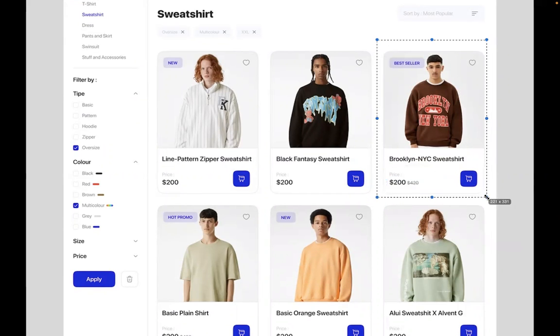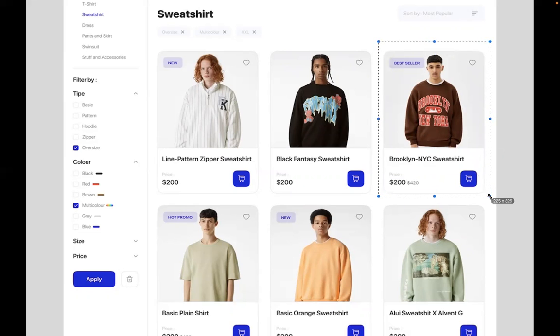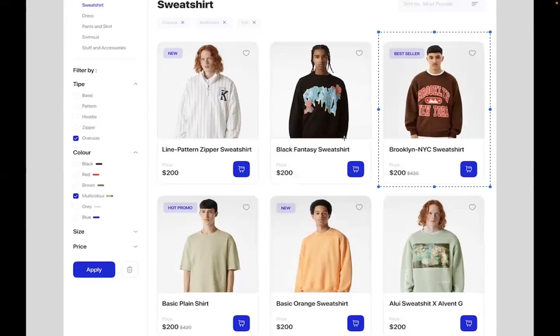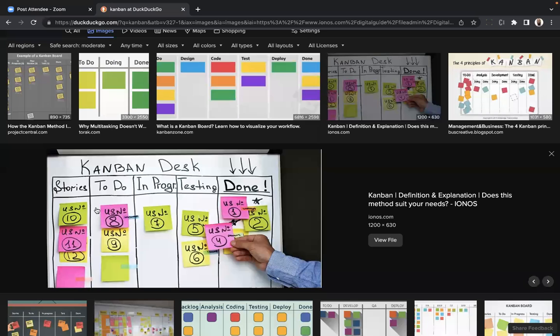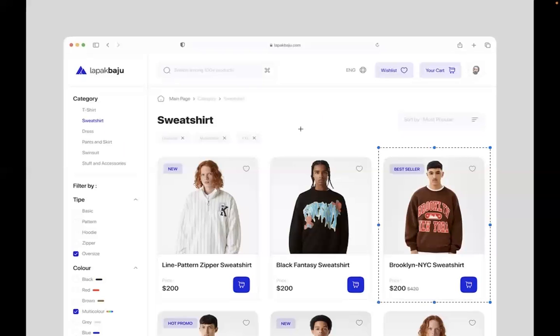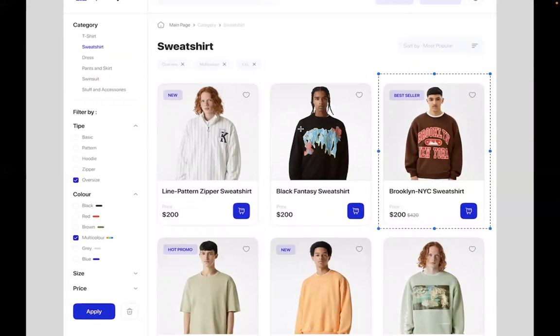Another task might say, after this button and this label are complete, create another one for this top portion here. And then after these three things are created, create a task that says put it all together to make it look like this. When I send y'all this Kanban, I want y'all to literally break these things down into the most minimal tasks you can think of, because that is exactly how we do it on a job. We literally break it down very small.